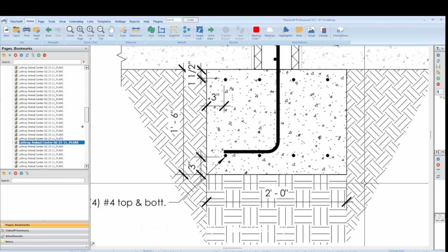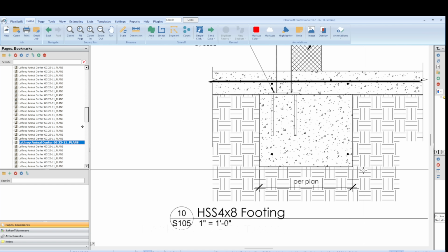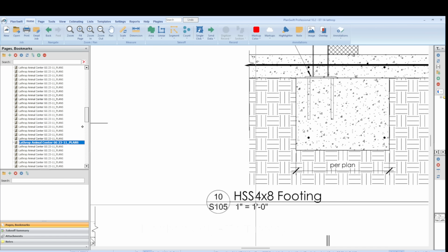So your length that you measured, times 2, times 1.5, because that's 6 inches. That's cubic feet. To change it to cubic yards, you divide by 27. That's how many cubic yards of concrete you have for this individual stretch, for pricing purposes. And you have to do it for every one. And it says per plan. Oh, it's the footing per plan.